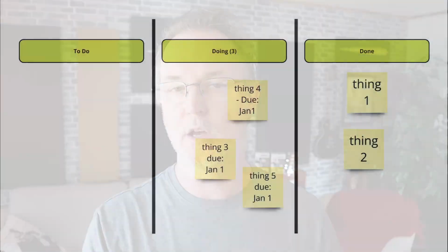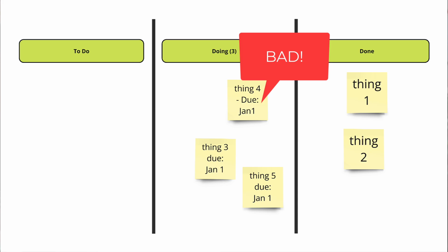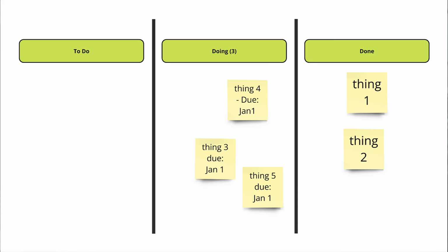Another little trick, there is something called fixed dates in a Kanban system. So if you're putting due dates on all of your cards, you're not in a pull-based system either, and you're not going to get the benefits out of Kanban. So stick to those 3 rules. Make it visible, limit your work in progress, maximize flow.